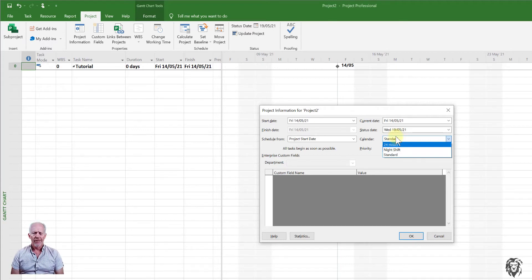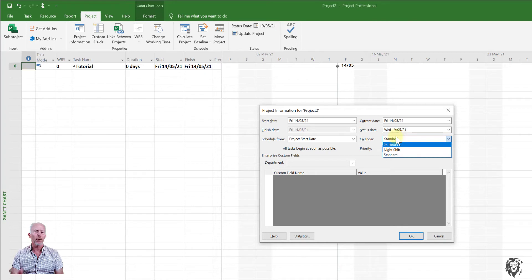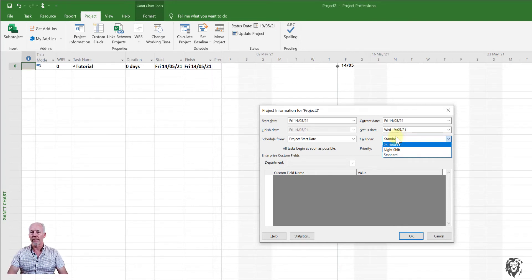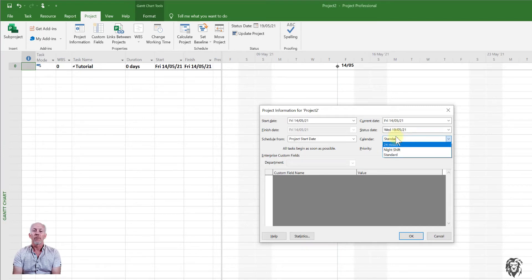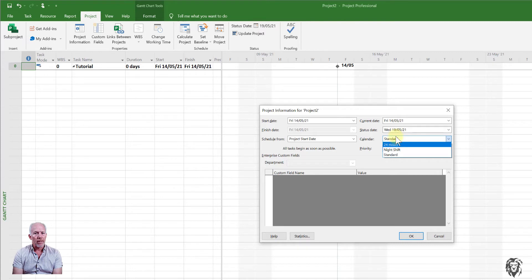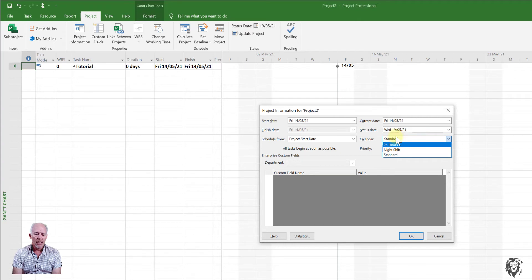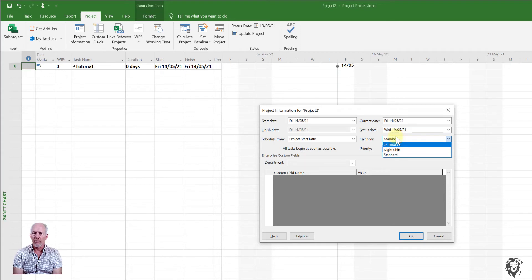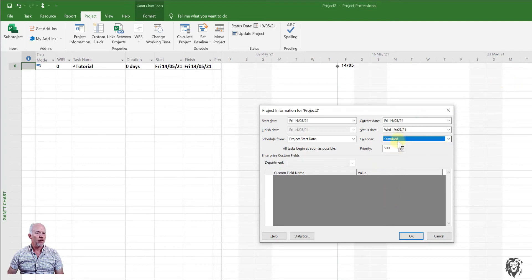It's probably one of the more, I don't know, I find a little bit obtuse tools or methods within Microsoft Project. But once you figure it out, you can kind of struggle through it. But we'll do a separate tutorial on that. But you do want to make sure that you're choosing a calendar that reflects the plan that you're going to be moving forward to. So one thing to keep in mind when you're choosing a calendar is that Microsoft Project, despite what it might display, works in hours. And so the calendar interprets how many hours are in each day and when those hours are and that type of thing. So it becomes rather important that you get it correct.